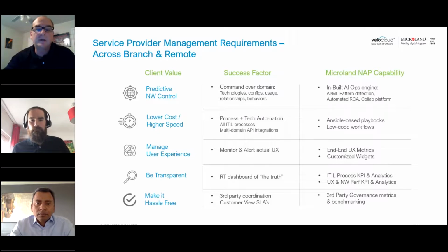Second thing I'm going to need to do is create, build and test my design, but I just don't have one design. Think about the variability of design by different site branch types, as well as both those power users and remote users. So I'm going to need multiple designs. Third, I'm going to ultimately need to order all the circuits for my offices, devices, and software for my branches, and ensure the supply chain has the capability to deliver these things.